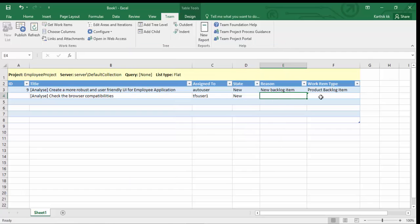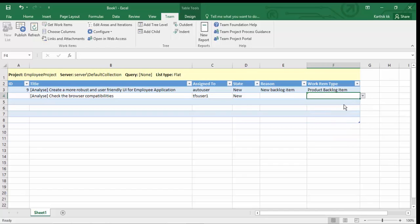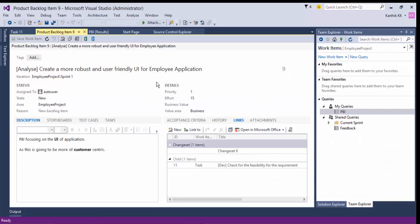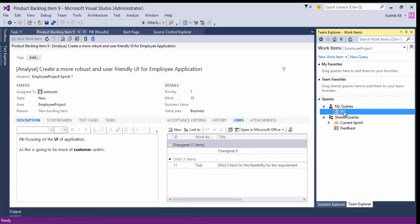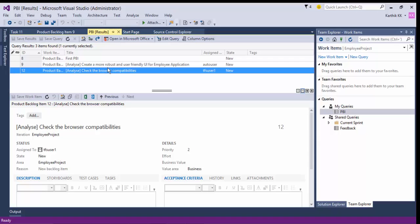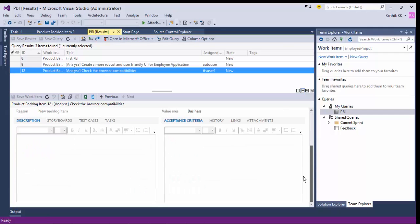I'm going to hit Publish. We need to make sure to select the work item type — I'll set it as Product Backlog Item — otherwise we'll get an error. I'll hit Publish and you can see the operation completed successfully. Now if I go to Visual Studio and do a refresh, you can see that our new PBI is also added there. This is the other way to add a work item from an Excel sheet in Team Foundation Server.